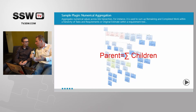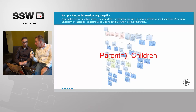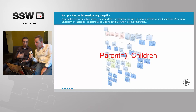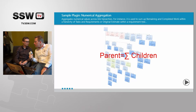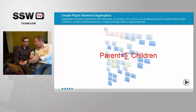In a PBI you'll be able to see a sum of the children tasks, for example, if you configure it so. You can configure what fields aggregate to what fields and what hierarchy linking you want to use — it's configurable using XML files on the server side. You can simply add your fields and do your aggregation. This is an extremely commonly requested thing by clients.